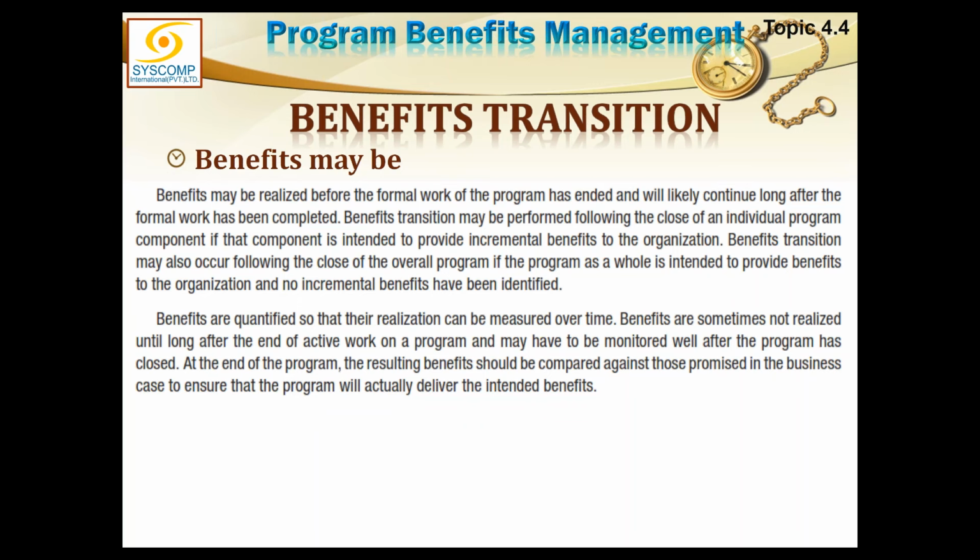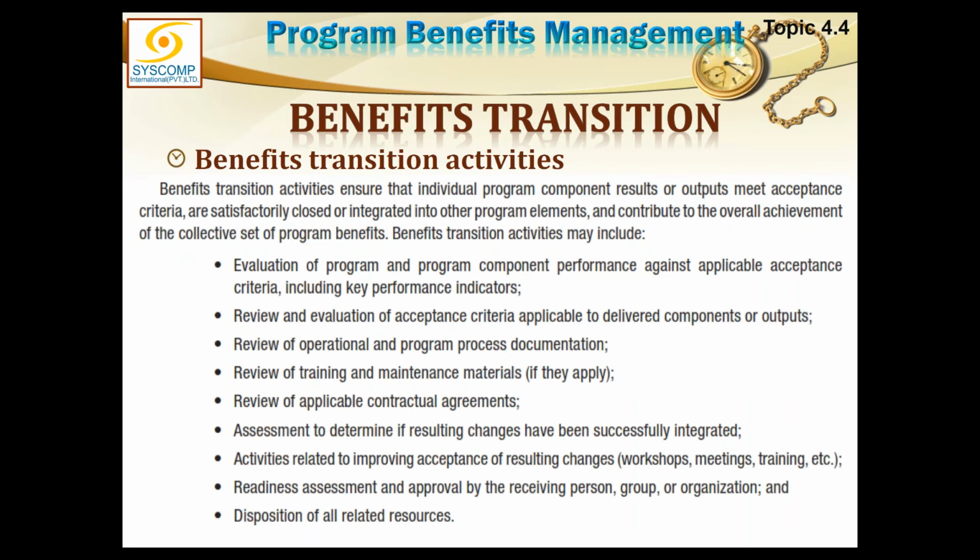Benefits are sometimes not realized until long after the end of active work on a program and may have to be monitored well after the program has closed. You see, even if the program has closed, somebody has to keep a watch on those benefits. Although when the program has closed, it is not the responsibility of the program manager, but somebody should take on the responsibility of ensuring that the initiative which has been left behind should be operational to the optimum. At the end of the program, the resulting benefits should be compared against those promised in the business case to ensure the program will actually deliver the intended benefits.